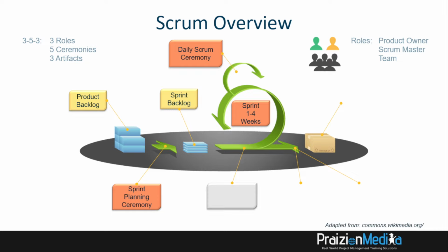Next, I want to accentuate the importance of doing some prep work for the next sprint, because this is the concept of rolling wave planning. And as we are planning in waves, we are going to have to refine our backlog. We refer to this as a backlog refinement. The backlog refinement ceremony, or event if you will, is not one of the formally identified events, but it is something that should happen.